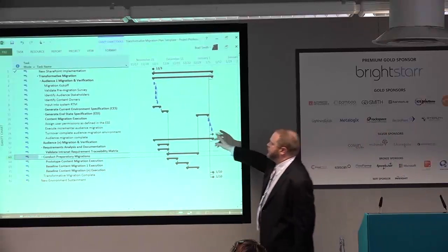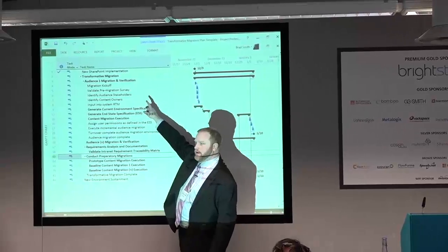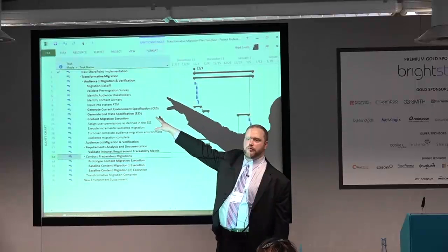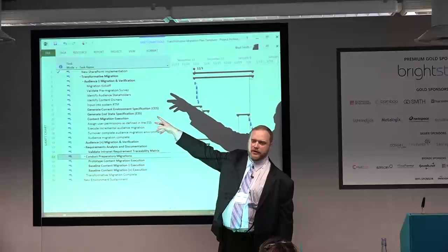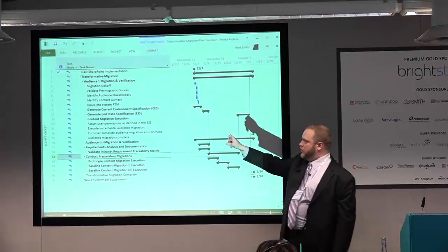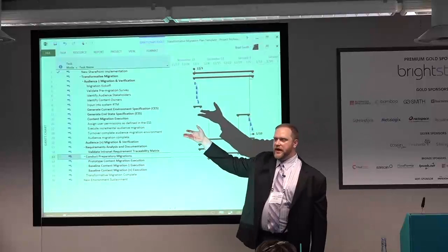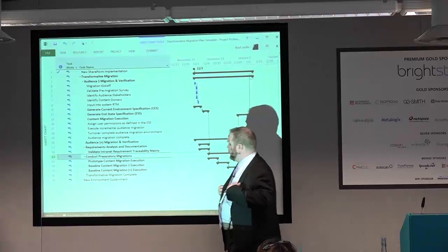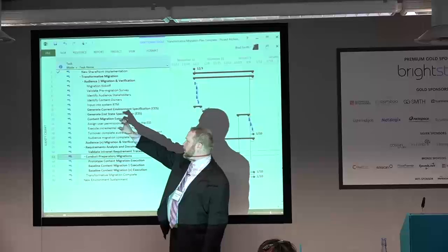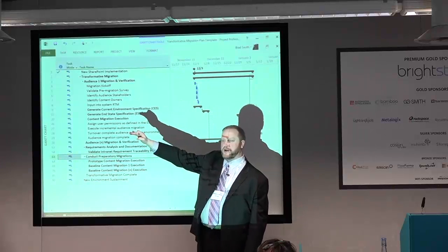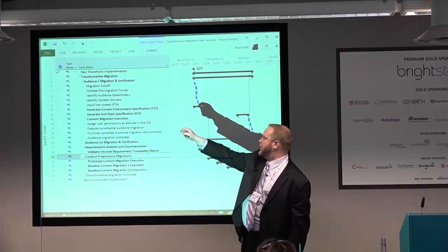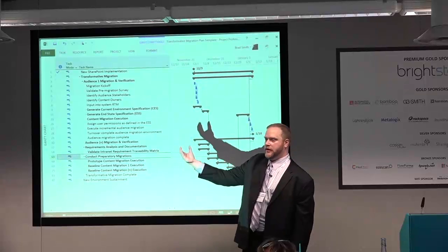So, audience migrations. They are starting first, right? We're going to the audiences. We're kicking off the migration. We're doing a pre-migration survey. You should do a pre-migration survey. For the stakeholders, you're identifying the people that are going to be participating in the migration on behalf of that organization, that audience. You're doing all of these things, right? We're generating the current environment specification. We're generating the end state specification for this audience. We're doing this for all the audiences at the beginning of the project, right?